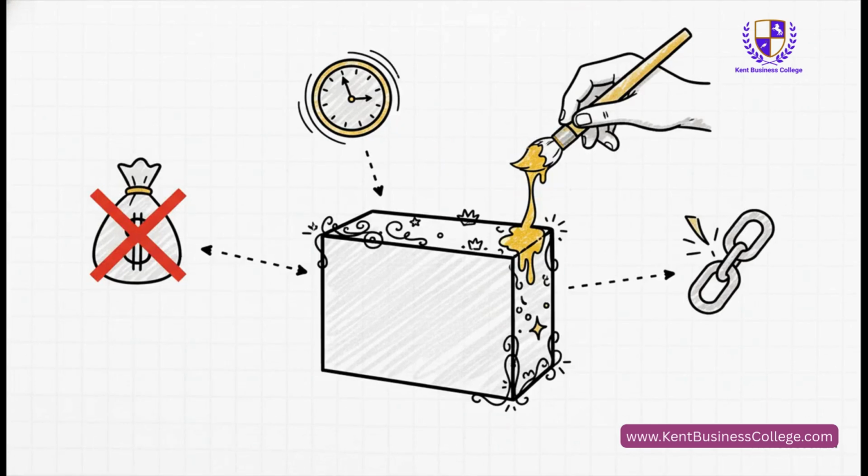And this leads us to a classic trap, something called gold plating. It's so tempting, isn't it, to add a few extra features that you think the client will absolutely love. But from a PMP point of view, you are not adding value. You are adding unapproved scope. And that just brings in new risks, new costs, and probably new bugs. Just stick to what was agreed.